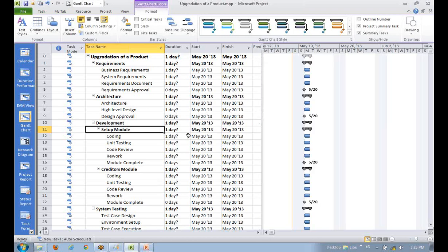Vivek, what is the benefit of this summary task? Yes, there are some things attached to it, especially cost and the budget. Budget can be allocated to only the ID 0 task, the project summary task. You cannot allocate budget to any other task. It can be allocated to the project budget actually. We are not going to discuss those parts, so it does not make much difference, but I showed you this functionality basically. That's pretty much higher level. Otherwise, it doesn't matter.